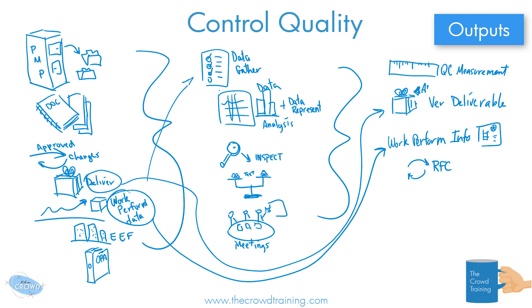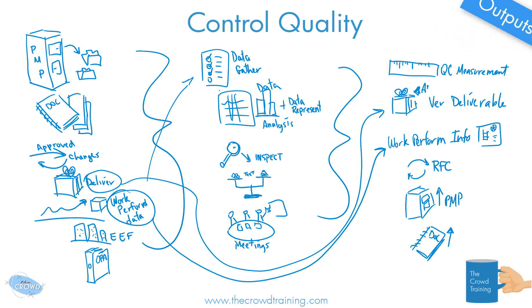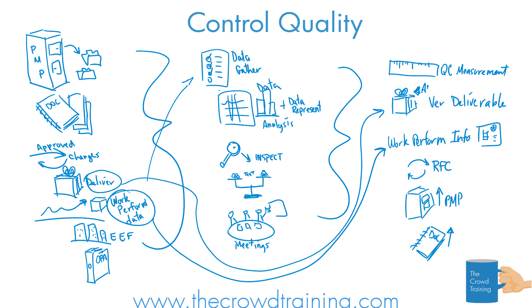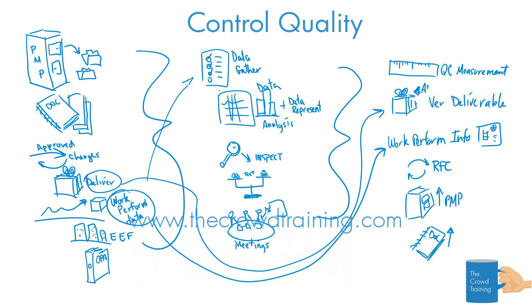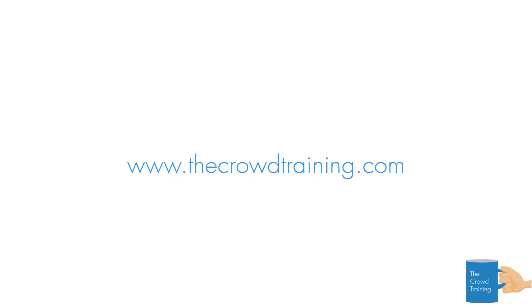And as we are making our way through the quality process, we are updating our documentation and our plans. So there are going to be updates to the PMP — the project management plan — and updates to our project docs as well. Things like if we learn something, we better update the lessons learned. So that, again, is a quick review. We've already gone through all of these, but this is a nice little review of all the inputs, outputs, tools, and techniques of control quality in the sixth edition of the PMBOK from Crowd Training.